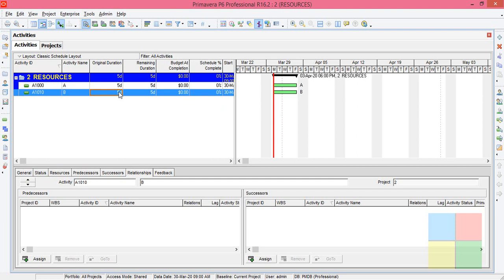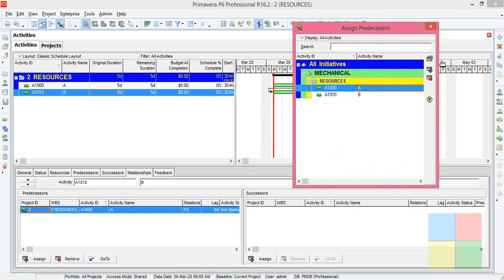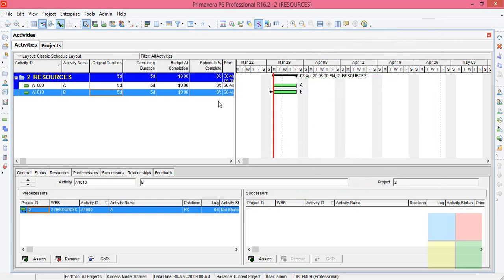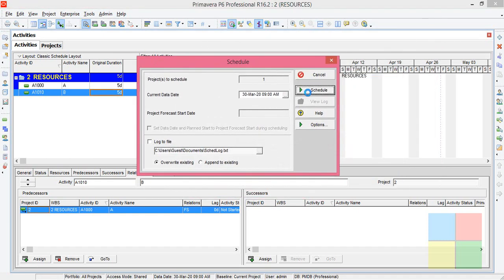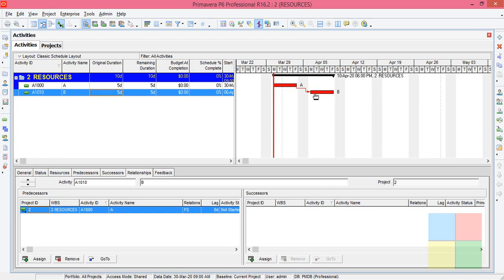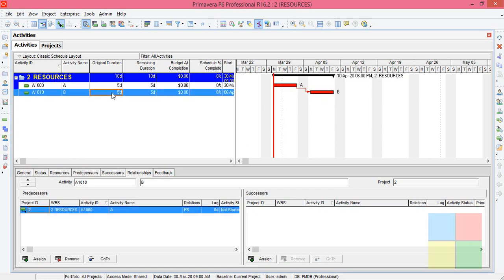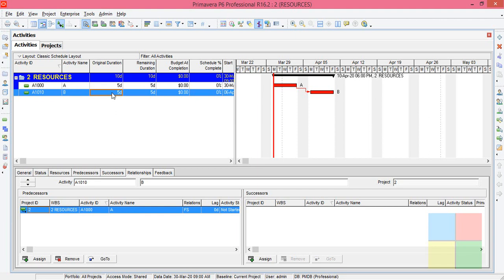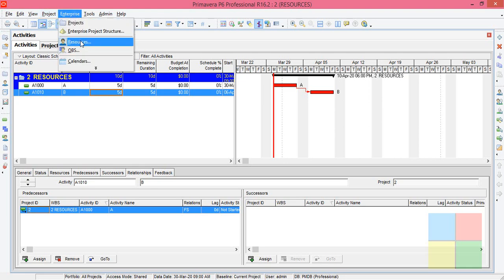The next thing is I'll assign the relationship for activity B. I'll highlight B, go to Relationships, then go to Predecessor where I assign A as the previous activity. Now let us schedule so you can understand that after the completion of A only, activity B will start.